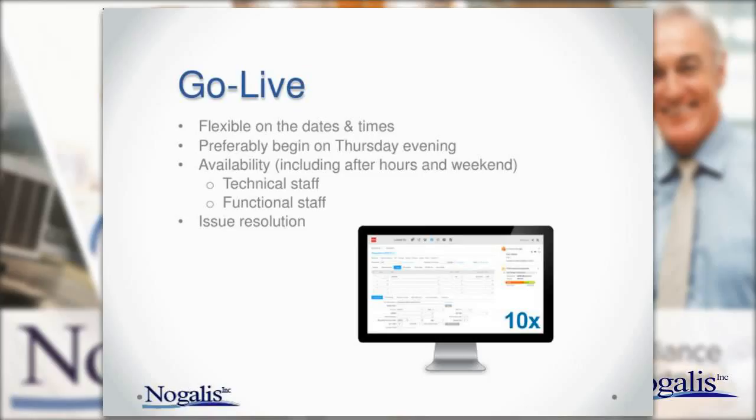We've done an upgrade in 14 weeks before, from beginning to end. Really quick customer, really great set of users, and they also played along with all the rules. But we actually had a lot of challenges in that project too. There was some server security stuff that held us up for a week and a half or 2 weeks. But 14 weeks is a pretty quick upgrade, and that was 2 servers with all the bells and whistles. So you might want to consider that.